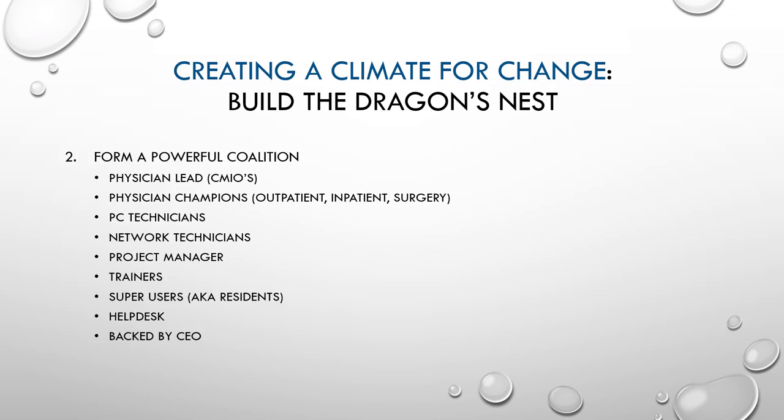Let's do it. So we formed a big group. There were the CMIOs, and I led the group. Then there were physician champions from all arenas. So we put inpatient, outpatient, ER, and then all the IT groups, so PC technicians, network technicians, project managers, trainers, the super users, which essentially are residents, our computer trainers, help desks, and the CEO backed all of it.